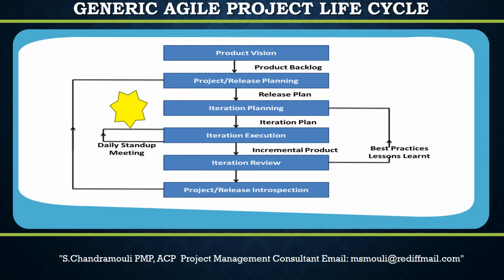Time-boxed plans are the mostly preferred way of release planning. This will constrain the amount of work, and people will automatically start doing the prioritization, which is the fundamental concept of Agile. At the beginning of each iteration, iteration planning happens, followed by iteration execution, iteration demo, and iteration retrospection. In an Agile project, the team works in iterations to deliver the final end product.